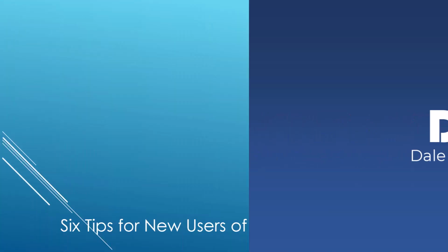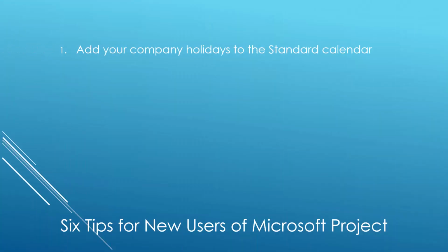So let's get started. My first tip for new users of Microsoft Project is to add your company holidays to the standard calendar. This is a really important step for you to take because you don't want Microsoft Project scheduling work on your company's holidays. So let's take a look now at a couple of videos that will teach you how to add company holidays to the standard calendar in your Microsoft Project schedules.